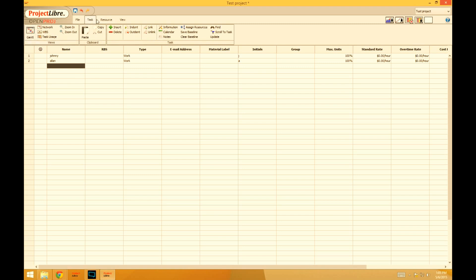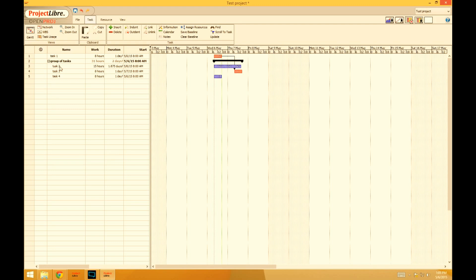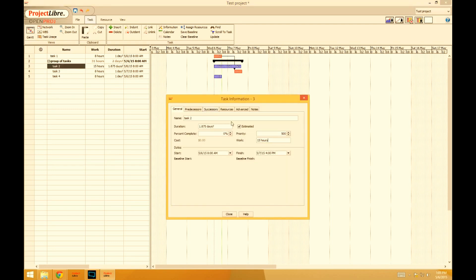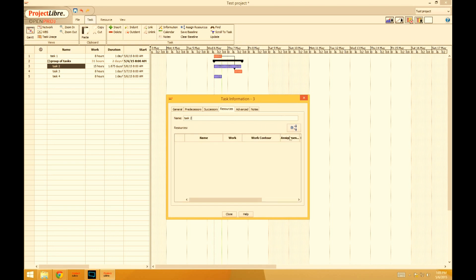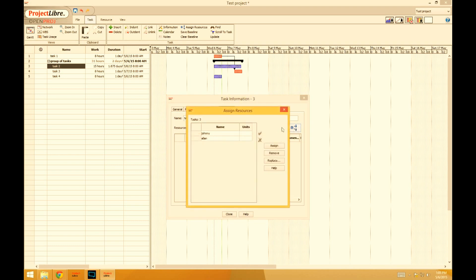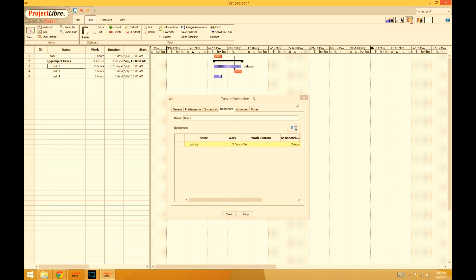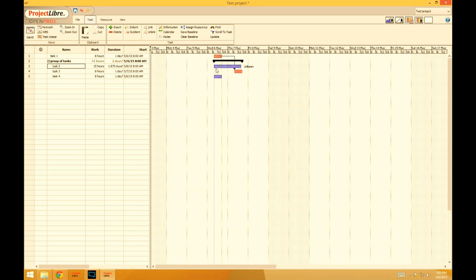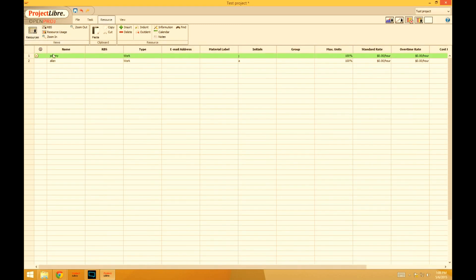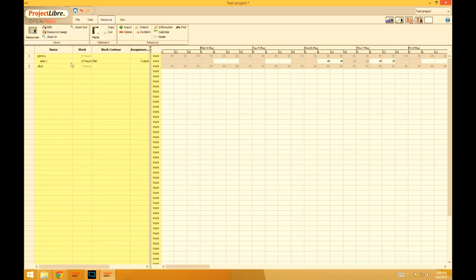I go back to my tasks — Task, Gantt — and I'll double-click on one of my tasks. In the task detail information, I click on the Resources tab and this small icon up here. Then I'll be shown the different resources I'm capable of adding. Clicking on it, I click 'Assign.' Now Johnny is assigned to task 2. You'll see Johnny mentioned for task 2 out here. You can also get an overview of how much your resources are utilized — go back into the resource view and click on 'Resource Usage.' Johnny here is doing task 2 for 15 hours.